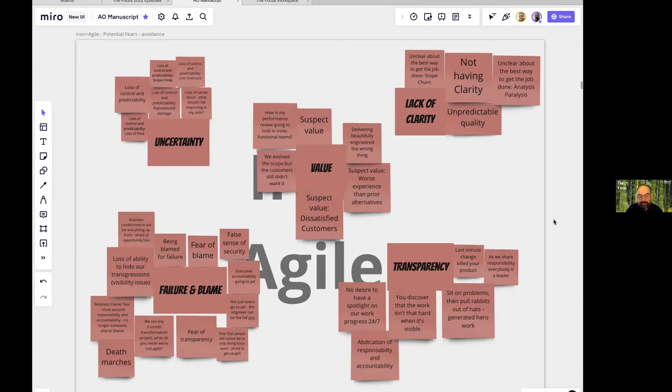Yeah. In a nutshell, a death march is a project in which we know we're not going to make it, right? This comes from the days of, I have a project. This is the scope. The scope says we have to make 57 things and we've only made 7 and there's 50 more to go, but there's only 1 month left. And we spent 12 months already. So whoops, making another 50 in the last month? Nah. And throwing more people at the problem is not going to help either, because that's another trick that we notice with death march projects: decision makers would throw more people at the problem.